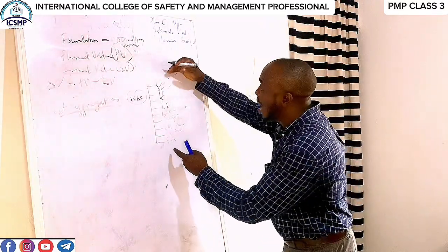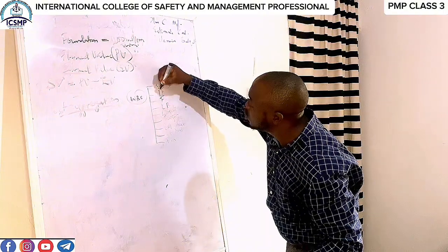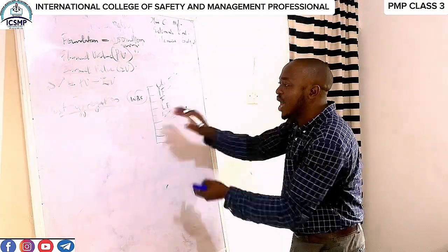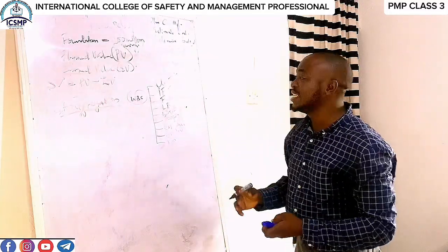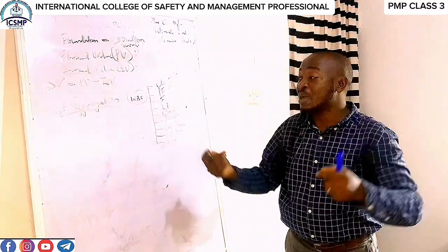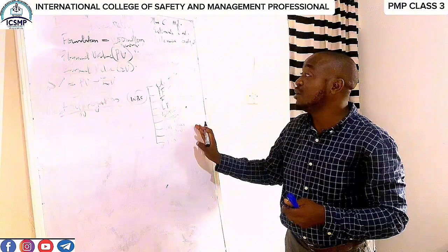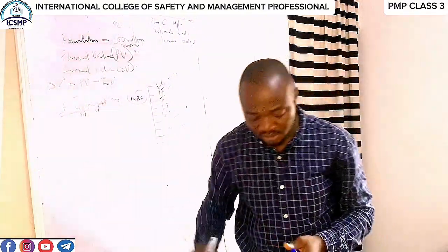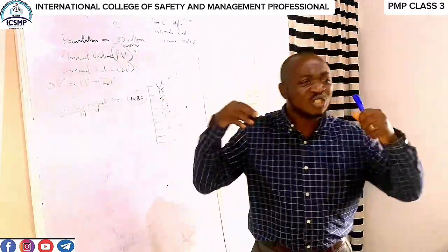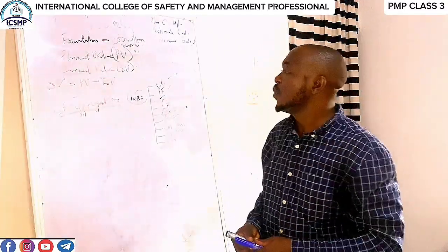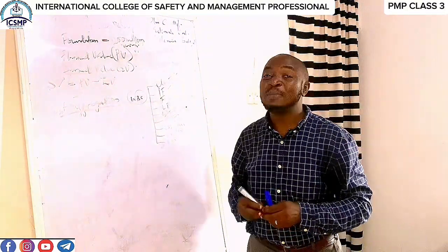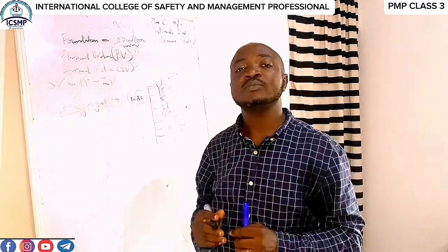So we, having determined the amount we will spend for each of these segmented tasks, we'll now add it up, aggregate, we'll add it up and get a rigid value to complete the entire project. Remember, when we want to now determine budget, we'll still consider our management reserve and our contingency reserve. So somebody is asking, what is even management reserve? What is contingency reserve? Now, contingency reserve is the cost we set aside for the manifestation of risk.